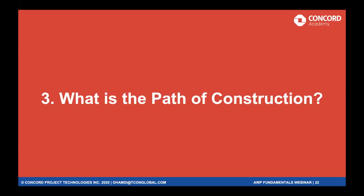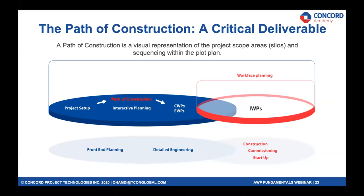I want to take time to explain what the path of construction is, because it is a key deliverable that tends to be forgotten in how AWP is taught. Owners and contractors we've worked with — even discipline contractors — have added the path of construction as a required deliverable at approval or assurance gates. This document, when you look at it, will tell you whether the project is going to be predictable or not. The path of construction is that deliverable with the visual representation of your areas and breakdown, underlining your logic of construction and connecting engineering, procurement, operations, and constraints into your construction plan.